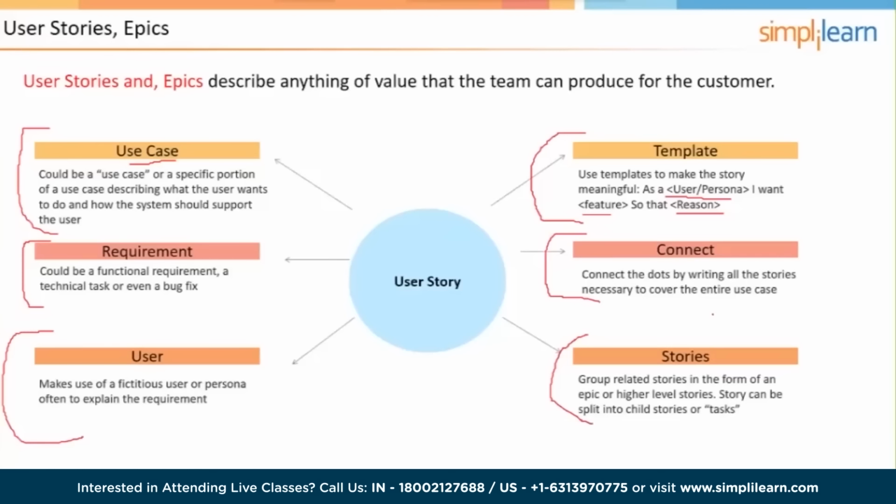Like in the question that we had at the end of the last section, where the product owner needed something done and the team said, well, based on the size of this user story, it's going to take 3 sprints to do. Well, a user story has to be small enough to be completed within a single sprint. So a sprint can contain more than one user story, but a user story cannot span sprints. So that feature or function that was in the question was probably more like an epic. It was something that would need to be disaggregated into smaller user stories, or perhaps it was more of a use case that would need more than one user story in order to actually deliver the overall use case.